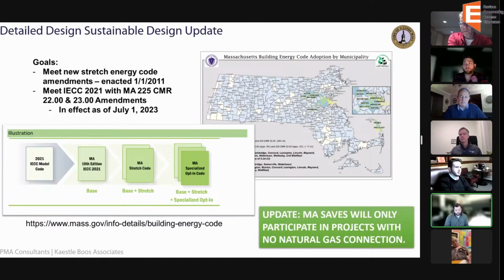We're performing this test well with a consultant and a driller that goes out and does these all the time. The driller, Skillings, is one of two preeminent drillers in New England that does this work. The information we gather from that will be as accurate as we can get with one well, when we're probably going to be doing 30 or 40 per building. And then we'll have that sized in so we can price that in design development.